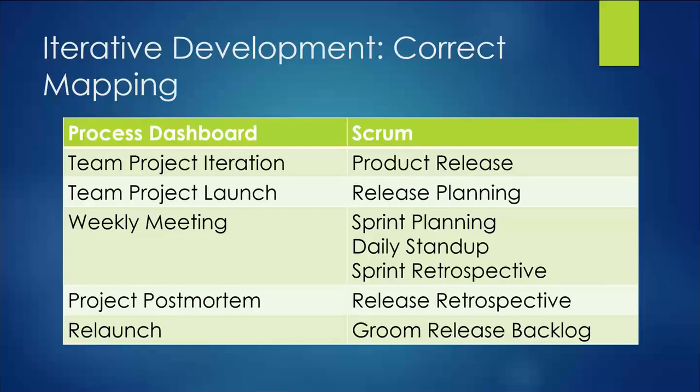David, this is Jeff Schwab. There's not a question, but I just wanted to give an example. We have a very major, large program in Navarre. They've stood up a SAFe, a scaled agile framework. They're using PI cycles that are quarterly, so 13 weeks long. First week is just what you're saying, planning the 6 sprints, 2-week sprints that they're going to do in that quarter based on high-level requirements.